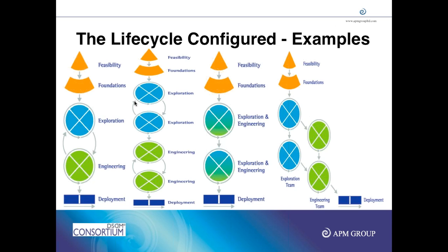In the first time box where we have got 4 weeks in hand, instead of doing analysis, design, development in the sequential manner and for entire requirements, we pick up some useful requirements, make a design, do development, do testing, and show something to the customer at the end of week 4.